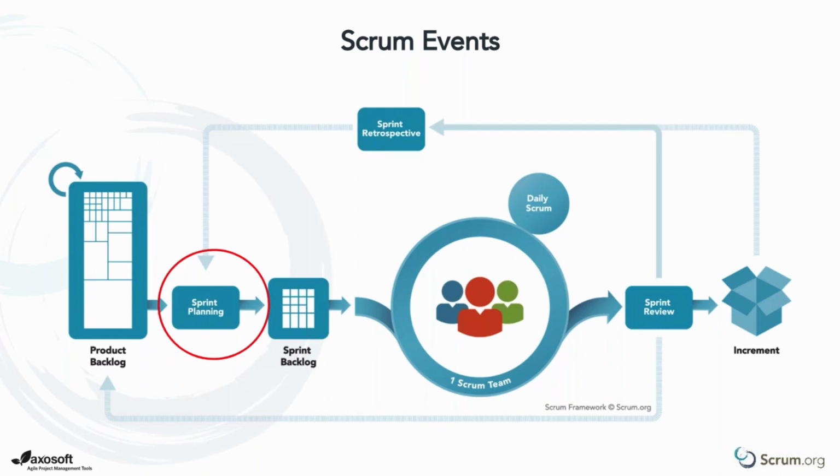What's really important here, if you remember back to the beginning, I talked about the fact that this entire picture is a sprint. You're always sprinting. So the minute I stop the last sprint, I start the next sprint. So sprint planning is that, I'll call it kickoff in quotes, to the current sprint. And we are now sprinting once we're in sprint planning.